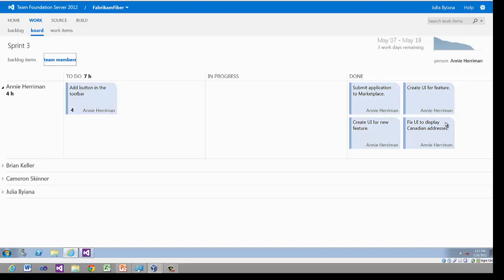feedback. So the first version that we wrote for Hotmail, you can see a list of different emails. It was not connected to the database, it did not pull live, it was literally a stubbed-out list of emails that wasn't mobile. We shipped that in a week, the owners looked at it like, actually, I'd like it to look like this, I'd like it to be able to do that, and we started to get a little feedback before we spent all that time writing it back and figuring out the data model. So that's the whole point, break it down to literally something you can deliver, and